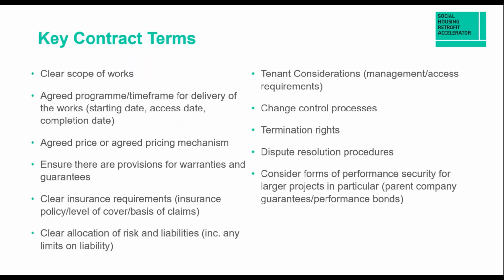Dispute resolution procedures. So what dispute mechanisms are there? Is there a tiered system like NEC? Ideally, you want something that goes through processes, and under the Housing Grants and Regeneration Act, a construction contract, there is always the right to adjudicate. So there is that right, but introducing things like more informal, maybe senior party negotiations or something like that before you get to those more formalised dispute resolution mechanisms, and ultimately court and arbitration, because those can be extremely expensive.